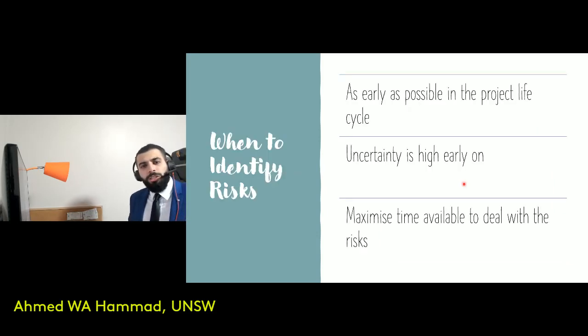Now, some questions that I'll be going through in the video. The first question is when to identify risks. The response to that would be as early as possible in the project lifecycle, and the reason for that is because uncertainty is usually high early on in the project, and thus you need to maximize the time available for you to be able to deal with that risk.